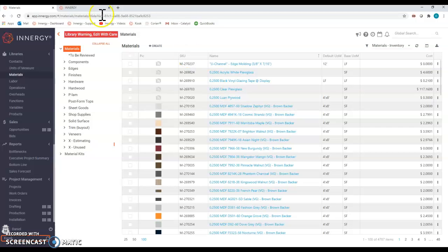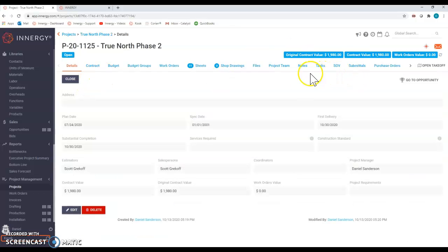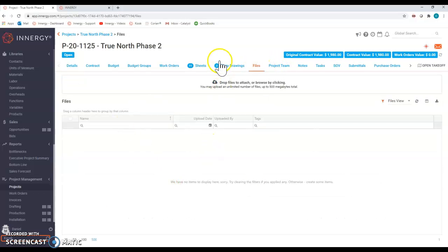And then last but not least, and I do think this is part of accounting, is the proposal and shipping. First off, on a project, I don't know why the proposal, when you say it's awarded, doesn't become part of the project. Our workaround, which we started Friday of last week when it was identified, is to print the proposal to a PDF and then upload it. But it really should just carry over. The information's there. I don't see why it wouldn't.